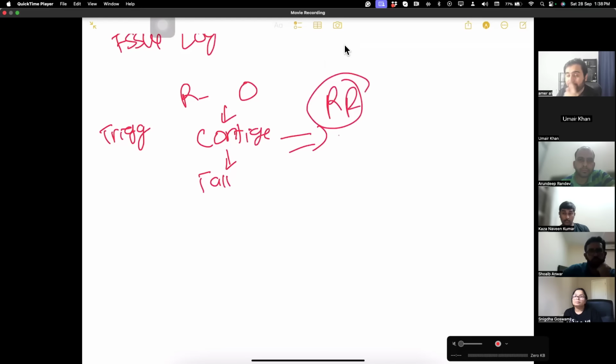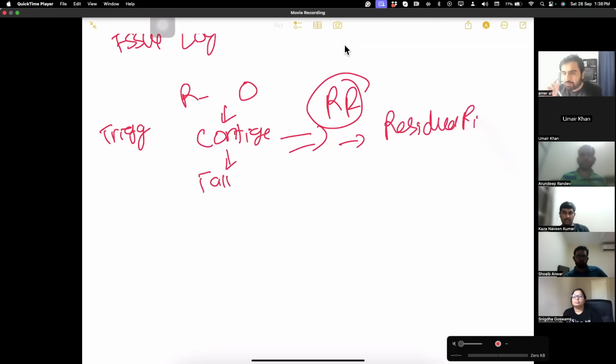Your PMI Infinity, the PMI or ChatGPT, is wrong on this. Maybe they will upgrade it and improve on it. If you ask it, they'll say update the issue log. Why? You will update the risk register. Then you will check residual risk, like a small risk that is left, or secondary risk.